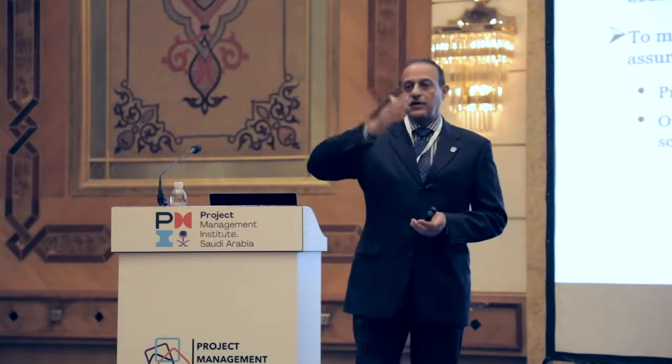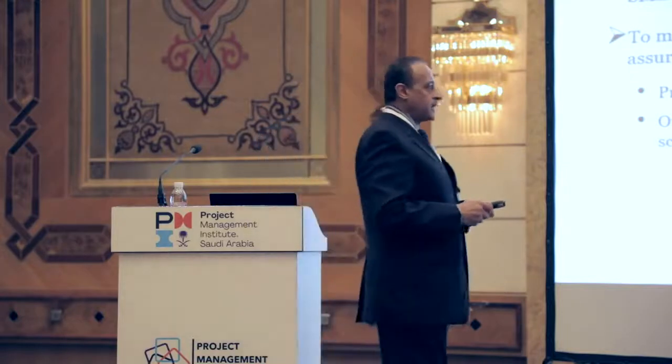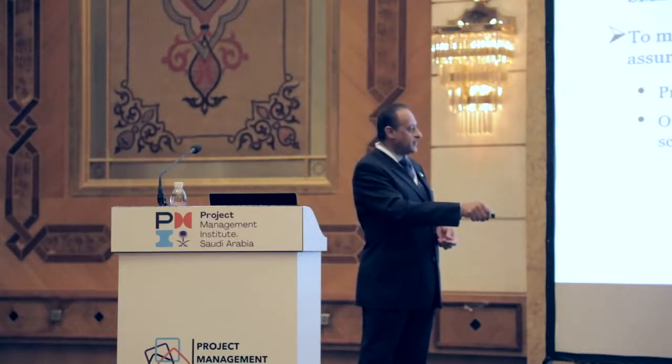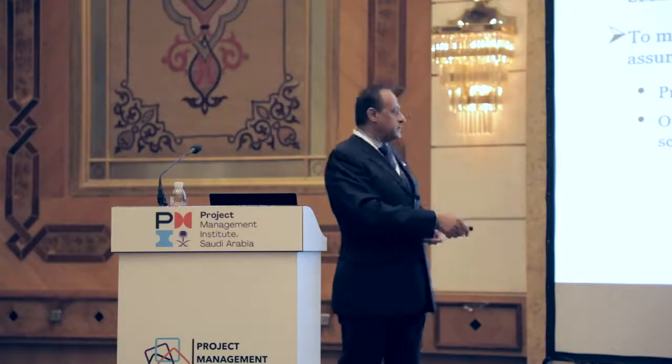Next, here comes the cold iron rule. Before each gate, an independent review team comes and helps the project team identify any risks that have not been mitigated or any opportunity that could be captured to improve the capital investment. So basically this team will come and find what these risks are. They will put them on a heat map, and will show you the impact of these unmitigated risks and how urgently you need to mitigate them.